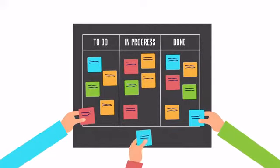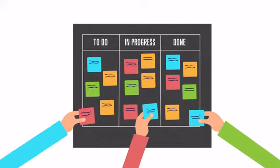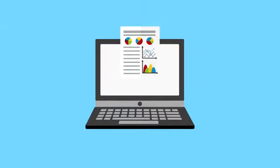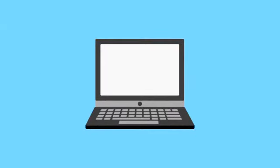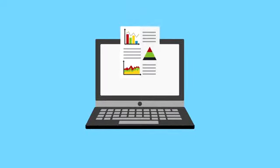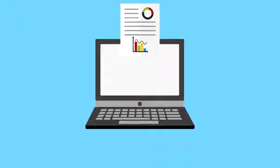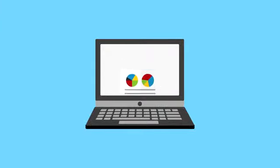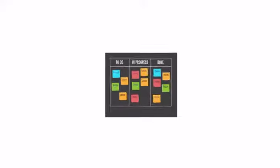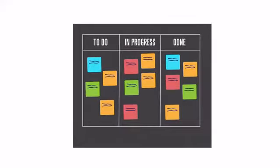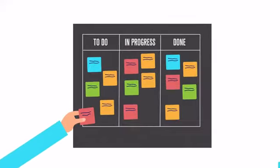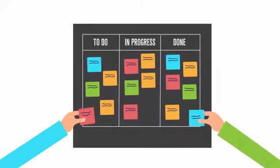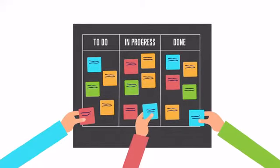The Agile Manifesto values documentation, but it values working software more. For software products, working software means the software meets what's called the definition of done. At the very least, developed, tested, integrated, and documented.